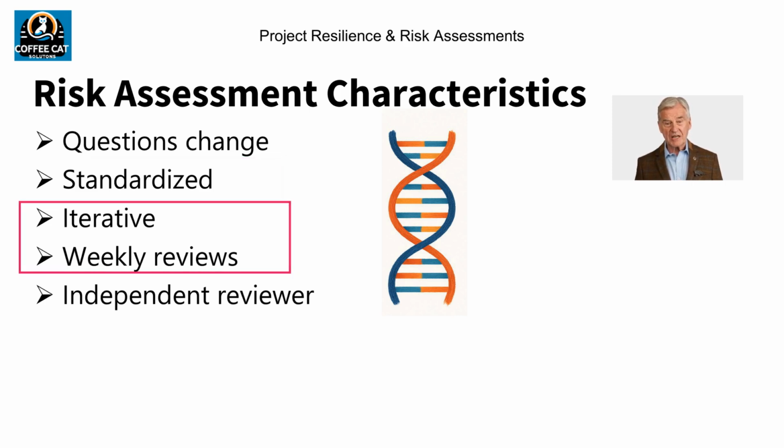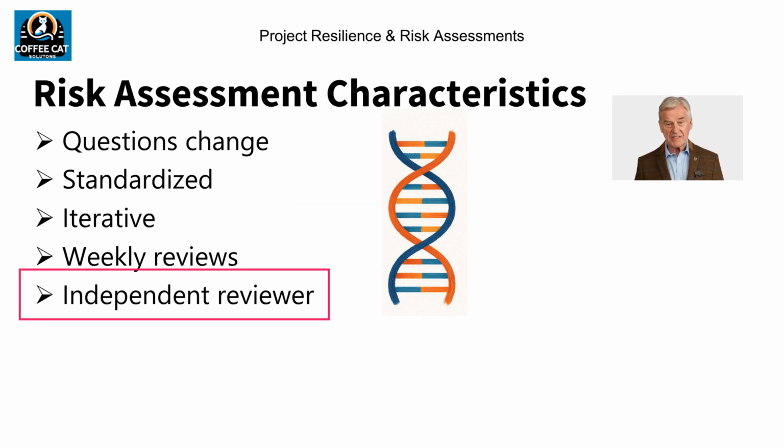Risk assessments should be iterative and performed weekly to catch project problems proactively and implement mitigations. Last, many risk management advocates suggest that an independent risk manager, PMO, or even an audit team should perform project assessments and not the project manager. Project reviewers that are external to the project and its team will hopefully be insulated from organizational bias, politics, and pressures to suppress negative, but important, project risk information.